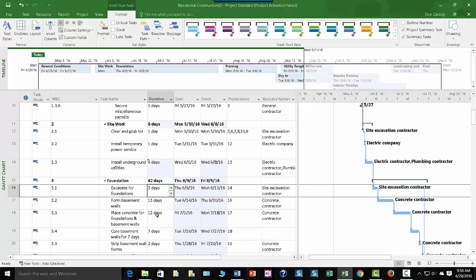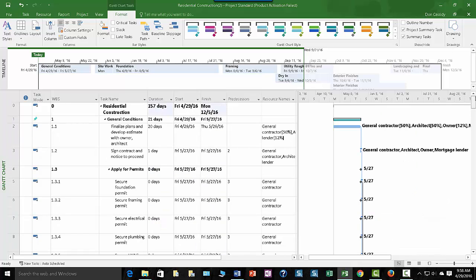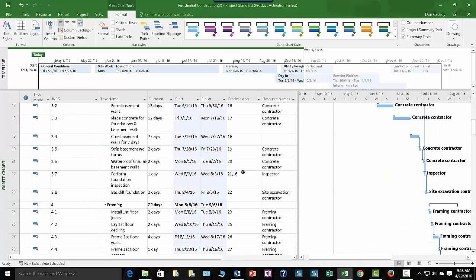That's what it's all about. Here, the detail here, not in the summary tasks. That's where you put it. That's where you change it. And you don't, to that end, you don't put it here. You don't put your tasks here at the beginning and guess, well, this is a 90-day project. You don't do that. You let the details figure it out. Automatically calculates it. That's what this is all about. Going back in, revising the details, it will sum up to it.